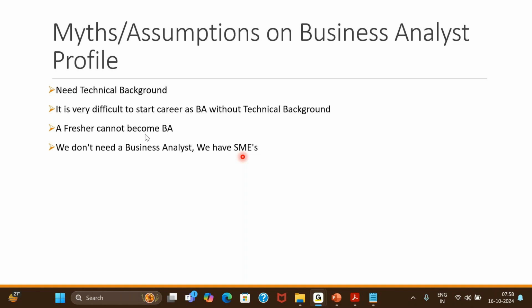Okay, so it's a parallel process. Developers and QAs will keep pulling requirements as you keep writing them. It's not as if I'll write 10 requirements and be done. Maybe you will write 10 as the first set, then another 10 as the next set, then another 10. So you keep writing new requirements by having discussions with the stakeholders.